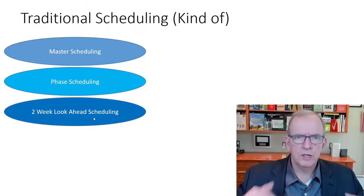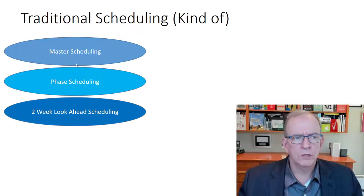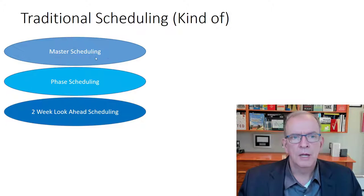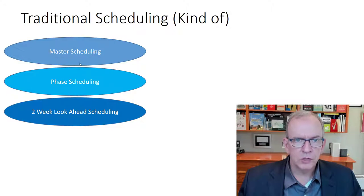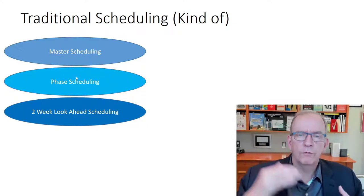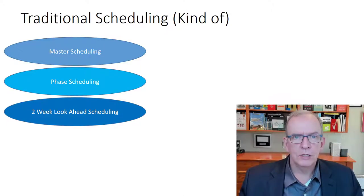What you're doing is really detailing that out and getting commitments from the trades involved in the work. The baseline schedule may have been developed without full involvement of the trades, or may have involved some major trades — perhaps your mechanical systems trade, your curtain wall supplier. But other than that, probably not much more in the development of the original baseline schedule. In phase scheduling, more trades should be involved because if you're not getting their commitments, it's very unlikely that you'll actually hit your targets.